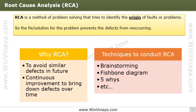The primary purpose of RCA is to find the real reason for the problem and come out with a solution so that the problem does not reoccur. You can put RCA results under lessons learned, which can be used by future projects to avoid similar defects. There are different ways to conduct root cause analysis: brainstorming, fishbone diagram, and five whys.